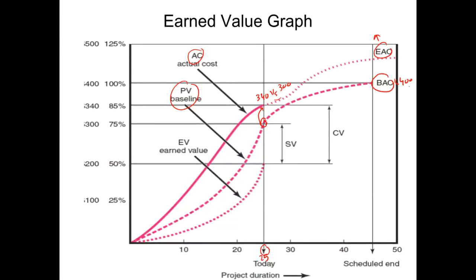So this project, which was originally supposed to take 400, if we continue at this progress, I think we can read it as maybe 470K, right? And also it was supposed to be completed around day 45, but now based on the work being reported on day 25 of the project, it will take 5 more days, so 70,000 over budget and, sorry, 5 days late.